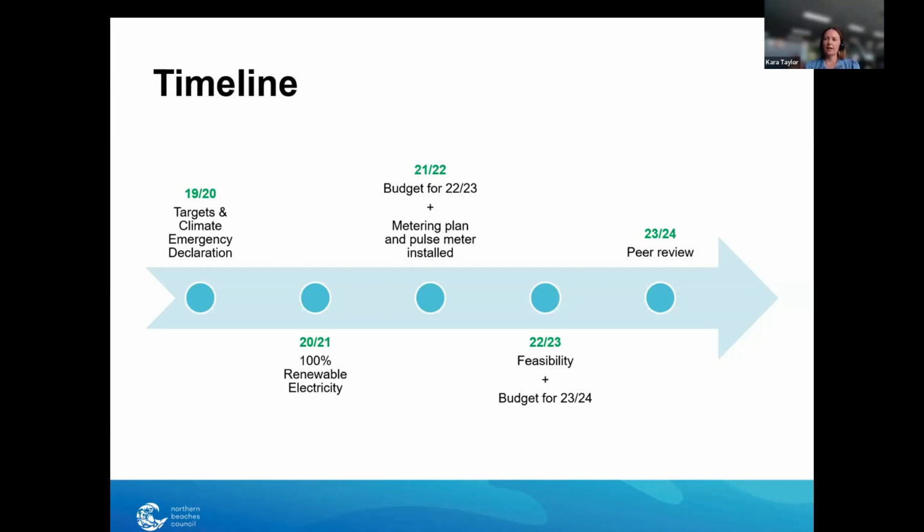The second stage of our RFQ at the time, we added on an optional second package for the technical spec for the future tender. And the reason we did that as a second stage is we weren't ready to sign on straight up because we didn't know what the outcome of the feasibility was going to be, but also how much it was going to cost and when we'd be ready to be doing those technical specs. But we wanted to have the option to keep the same consultant because it's going to be the most cost-effective